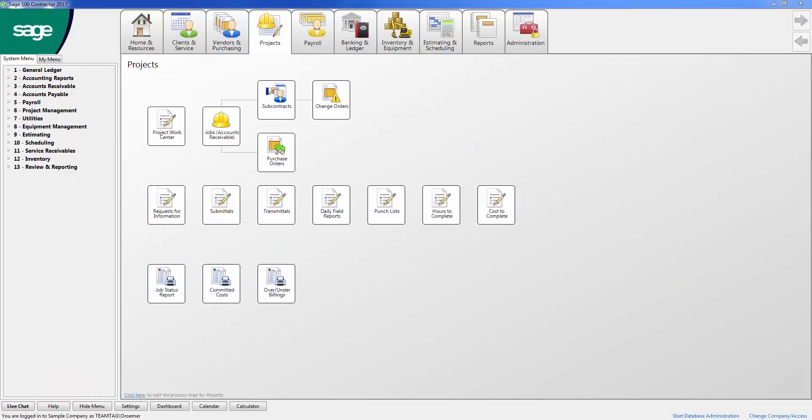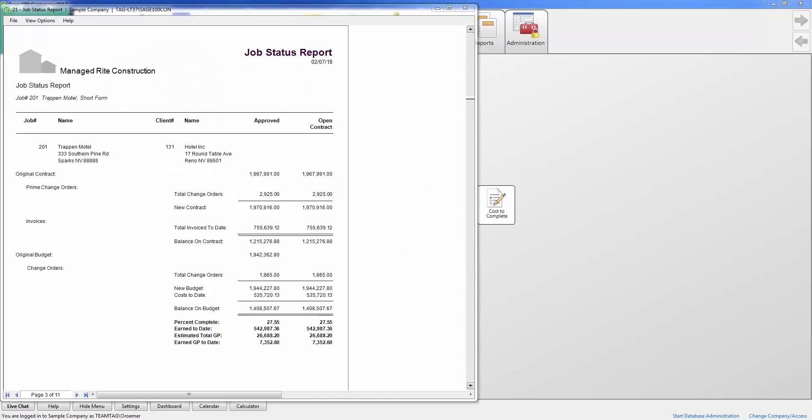Project management also provides various job cost reports that show summarized snapshots of the project, like this job status report, or more detailed cost reports, like this committed cost report. Within the job reports menu, the software provides you with 96 reports. As you see here, the job status report shows a simple summary of the job, with the contract value and invoices above, and the project budget and costs below.